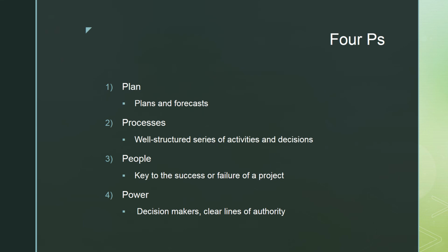So there may be a range of plans. The plan for this team and activity, a plan for that team and activity, a plan for that team and activity. And then also, alongside the plan, or allied to the plan, you have the focus. What are your predictions? What is likely to happen, right? You forecast the cost. Yes, we are budgeting for this. And you also are trying to think, prices may rise. If they're going to rise, they may not rise by more than 2%. So we are putting down a budget of this much so that we are not under budget when we carry the project out.